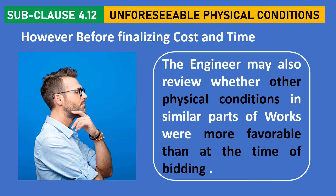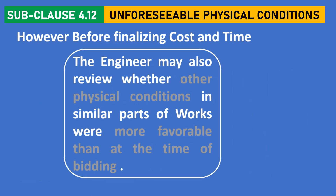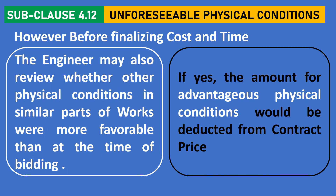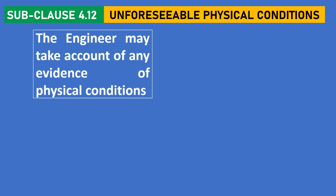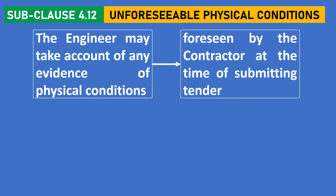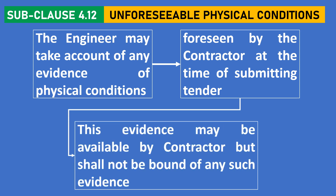Before finalizing, the engineer may also review whether other physical conditions in similar parts of work were more favorable than at the time of bidding. If yes, the amount for advantageous physical conditions would be deducted from the contract price. The engineer may take into account any evidence of physical conditions foreseen by the contractor at the time of submission of tender. This evidence may be provided by the contractor; however, the engineer is not bound to accept such evidence.